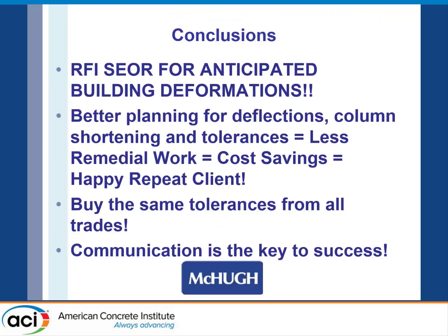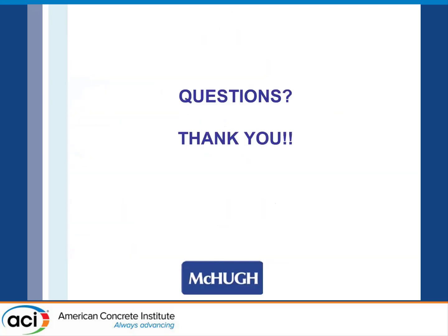So in conclusion, RFI the EOR for anticipated deformations. Better planning for deflections, column shortening, and tolerances equal less remedial work, cost savings, and happy repeat clients. And buy the same tolerances from all the trades. And as with everything, communication is the key to success.